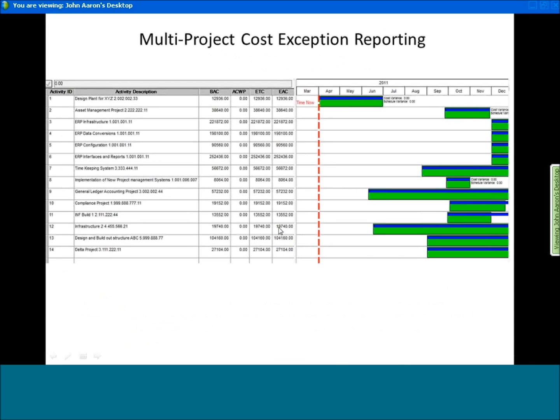It also allows, because it interfaces with tools such as MS Project and OpenPlan and so on, for cost management, you can also use some of the standard approaches for managing budgets, such as your Budget at Complete, ACWP, ETC, and EAC, all of these kinds of things, and track costs, because these are project numbers that you would use for your own accounting system.